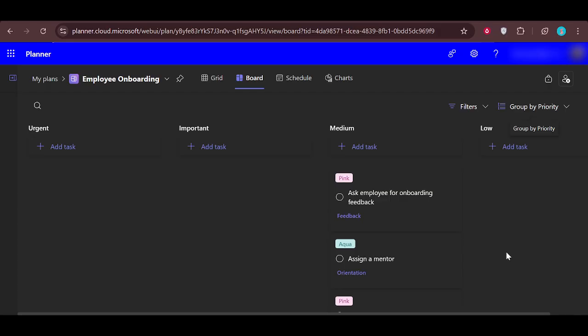By opening your project, going to the Group By control, and switching away from grouping by priority, you restore a clean layout where the critical path stands out as intended. That's all you need to do. Open your project, locate the Group By option, and change it from priority to no grouping so you can properly see and work with your critical path in Microsoft Project.